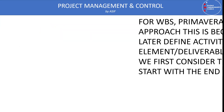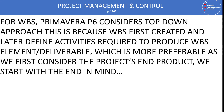In Primavera P6, the top-down approach is considered because first we create the WBS and get approval from all stakeholders or project experts. Once the WBS is defined and created, we later define the activities required to produce the WBS deliverable items. This is more preferable as we first consider the project end, meaning we start with the end in mind.